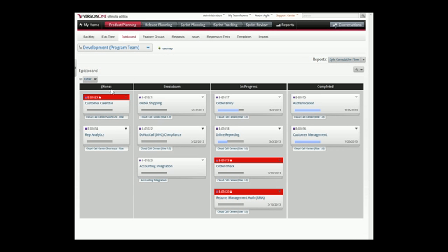And so if I'm looking at release 1 and I want to understand over the last 2 weeks, I know we made some changes as the product owner, and they made sense at the time, and now I'm here today and I'm wondering what I did. It's pretty easy in version 1 to look back and see what's been added. Okay, we had some defects that we said we had to get done, but we also added several stories. We didn't really remove anything except this one defect, and we also changed our estimate on something because we had a little misunderstanding about exactly what we were asking for with quick status checks.